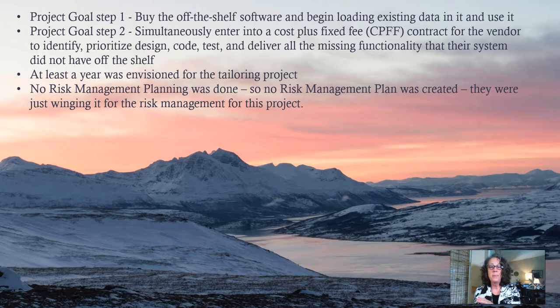And at the same time, enter into a contract with the same vendor that they were buying that software from, and having some of their analysts conduct a gap analysis to identify the gaps between their existing system and the functionality and the data it collected, and the gaps between that and the new system that had just been purchased. Identify all the gaps. Then the idea was they were going to pay the vendor to program all of that functionality into this system. So they thought this would take only about a year.